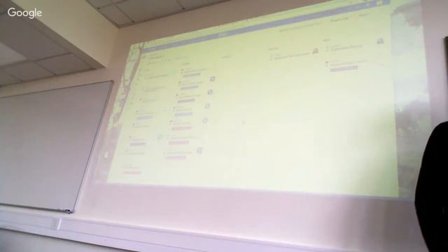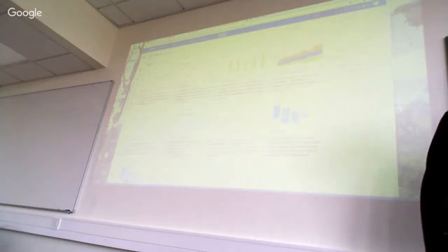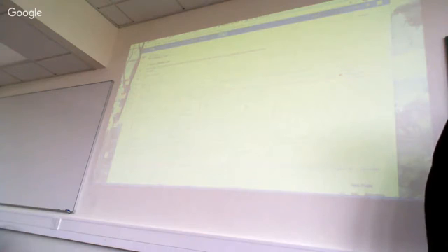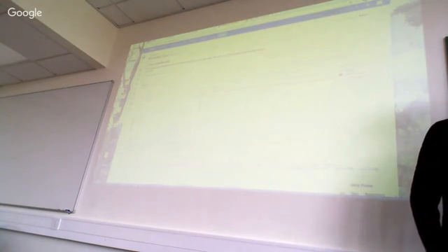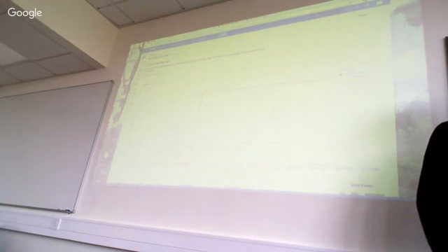So our burndown chart is probably not good at all. Yeah, I would guess. I think I looked at it yesterday and it looked kind of horrible. It basically shows no progress in work. That's probably because of many of the custom issue types like research. Simon had to activate estimations for us because we couldn't literally estimate in the tool. So we didn't have that until late in the sprint, so we didn't get to estimate at all. Okay, so that's probably why it looks like that.